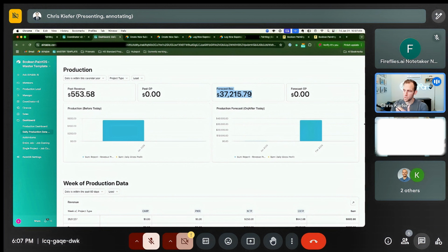And you obviously want to pull work forward as much as you can. Sometimes people don't put dates on it because they don't have a good system to remember that this isn't a solid date, this was just a guess. And so that's the difference for us. Scheduled is just, I put it on and I gave it to somebody, but ready is, this is a good date. And then I move it to ready once it's a week out and we're definitely starting next Tuesday or whatever.